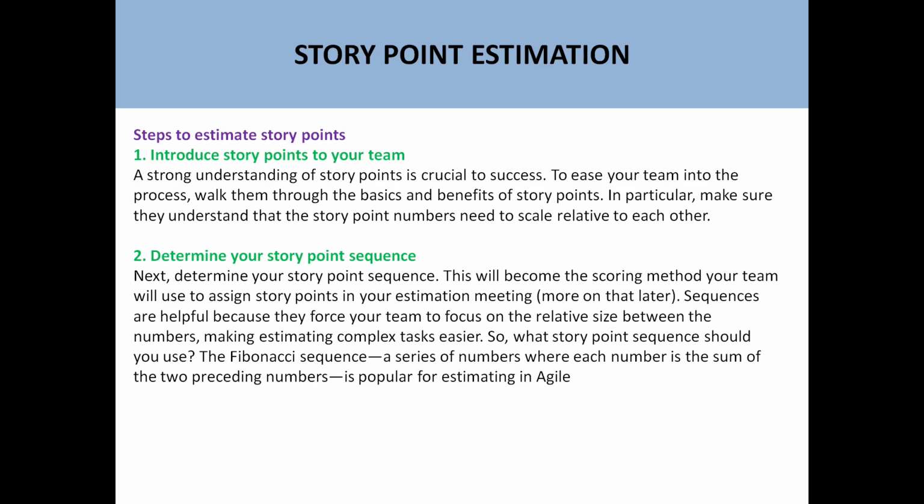Now the steps to estimate the story points. First step is to introduce story points to your team. In this step, a strong understanding of story points is crucial to success. To ease your team into the process, walk them through the basics and benefits of story points. In particular, make sure they understand that the story point numbers need to scale relative to each other. So basically, in this section, we define the story, the user requirement, and also we define the scale used to estimate the story.